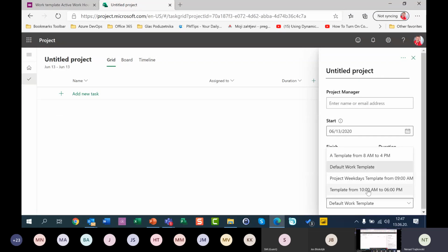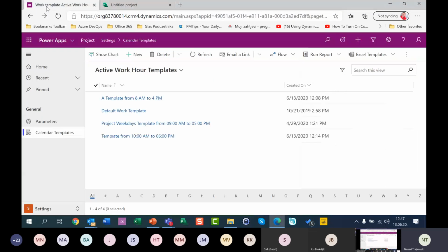So be aware that you can create a template and you can assign these calendars to all your resources, and still you can change the working time for your particular resources if that resource works at a different time or when you are going to create vacation. Of course, if you have national holidays which apply to all your resources, like, for example, New Year, Labor Day, etc., you should do it in your generic resource, and then all your resources won't work at that time as well.